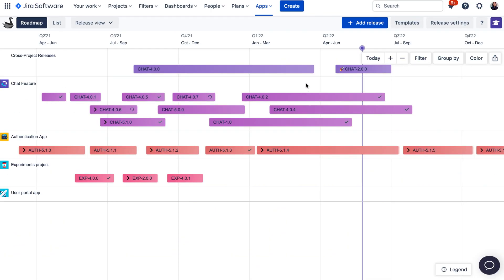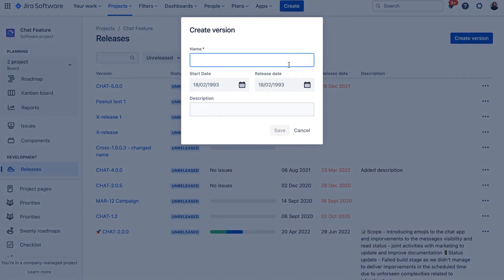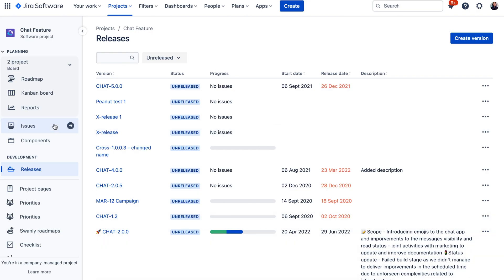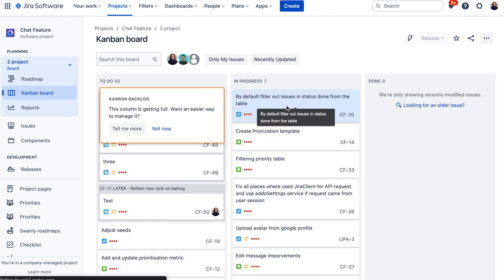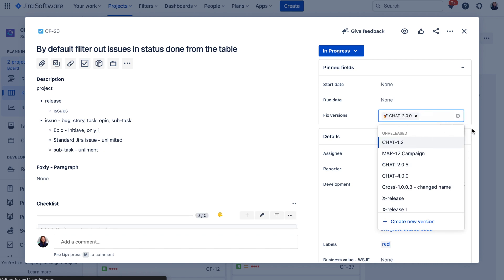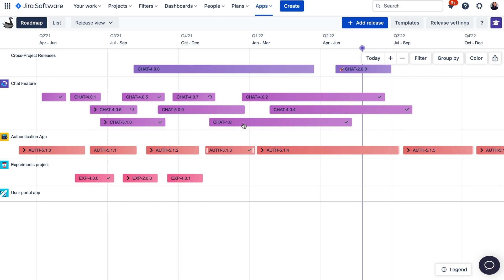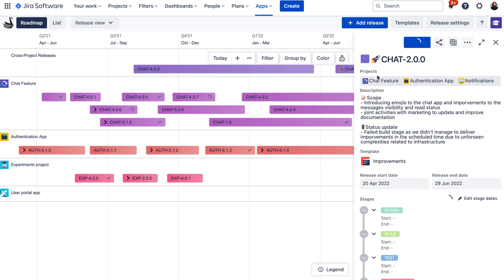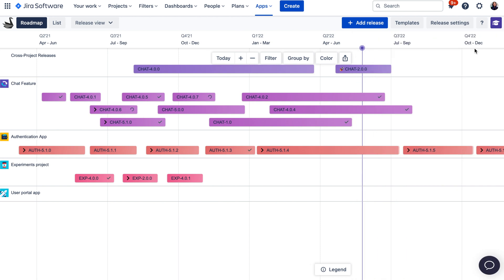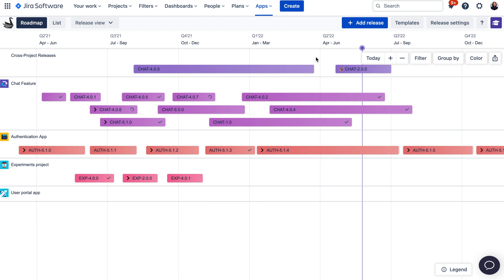Now let's have a quick look at the Release View in Swanly. Release view works with fixed versions in Jira, which are releases that you can create and track in your Jira projects under the Releases tab. In Jira by default, you can create releases with a name, description, start and end date, and assign these releases to your issues. You can then track your issues and see in what release they were delivered. Releases also have a status: released and unreleased. Swanly comes into play with the visualization of these releases on the roadmap and creating release reports. Let me show you how you can get started with the release view in Swanly.